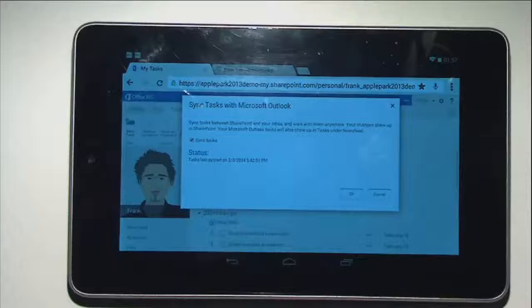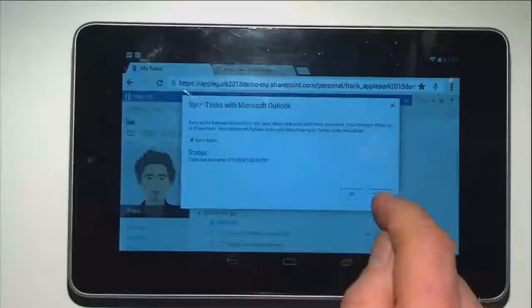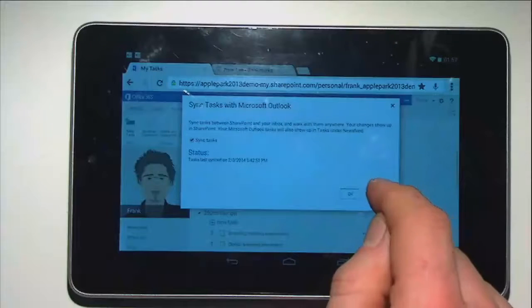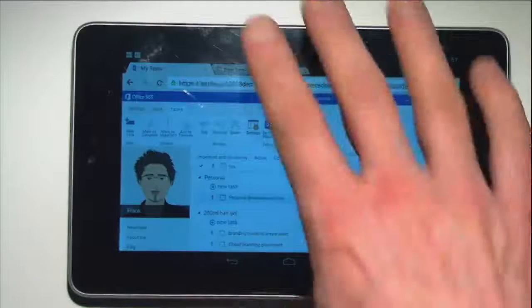I think we're going to miss this, unfortunately. When you look at when this sync happens, Microsoft say it happens every 20 minutes or so, depending upon load. I've been monitoring this for the last 3 or 4 days. As you can imagine, for me, it happens every 45 to 50 minutes. So if this last happened at 5:42, then it will next happen probably after we've left here. Alas. So that's not going to happen, but I can show you what would have happened, because we've demoed this before. So that's Frank.